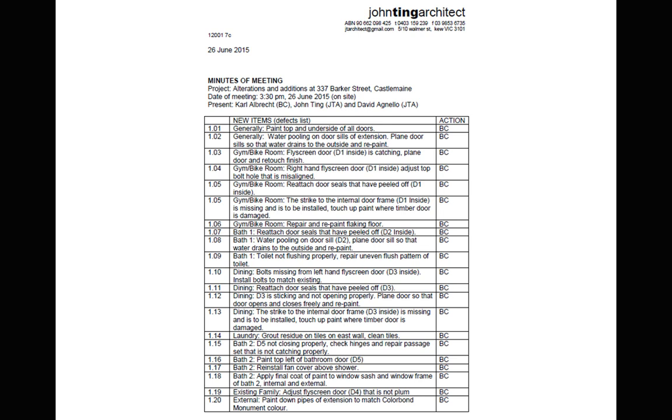Now remember that we're using the HIA contract, which means that there are no retention sums. So really, it's only the standard construction insurance, domestic warranty insurance, that the client has to claim on if the builder gets run over by a bus or doesn't want to come back or what have you. But the good thing is that it's the relationship thing. Both the builder and the client were quite active in the Castlemaine community, so I think everything worked out. There is an element of relationships that needs to be maintained on that front.